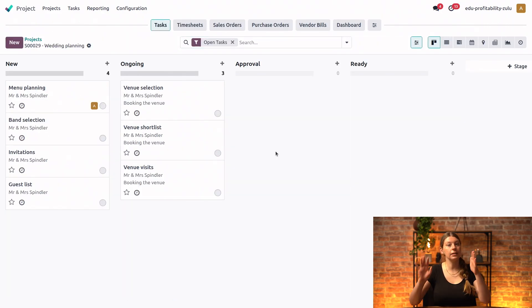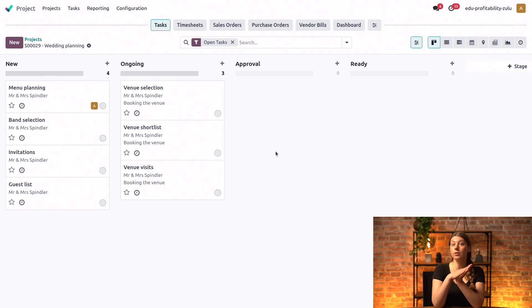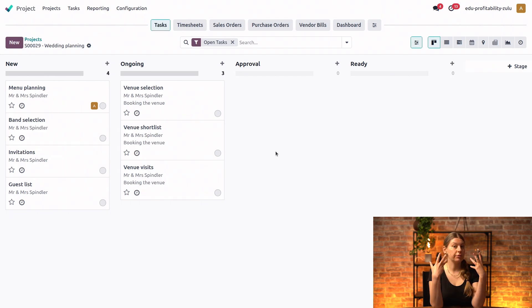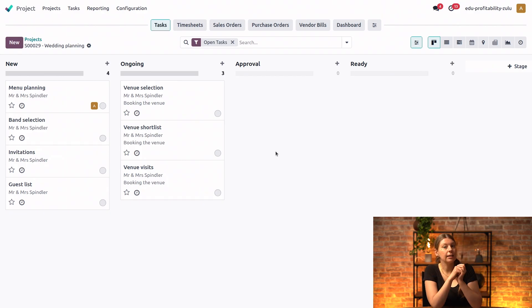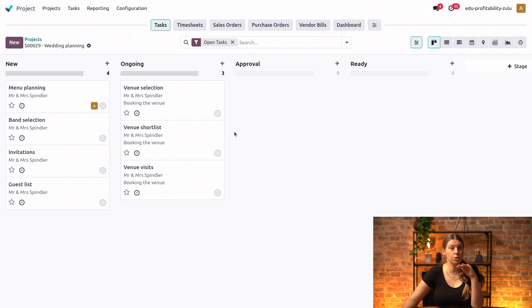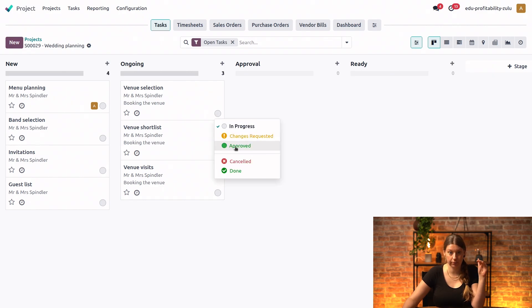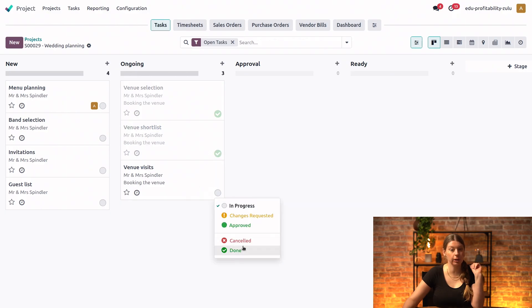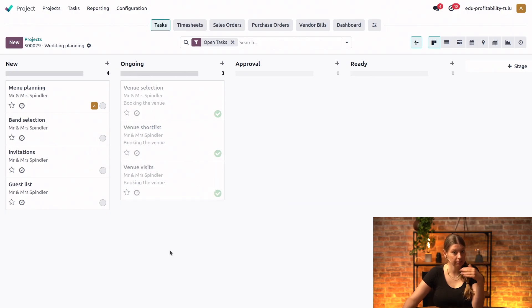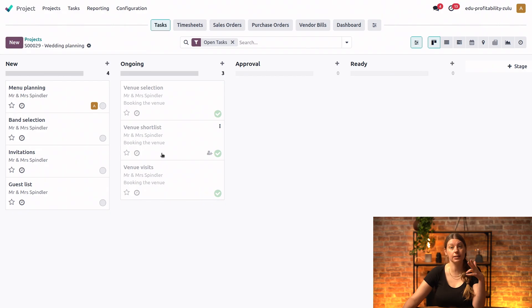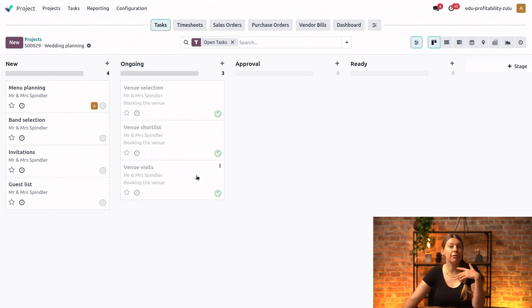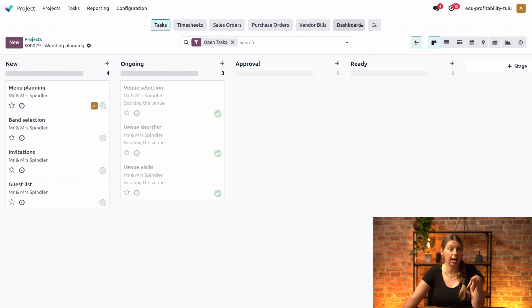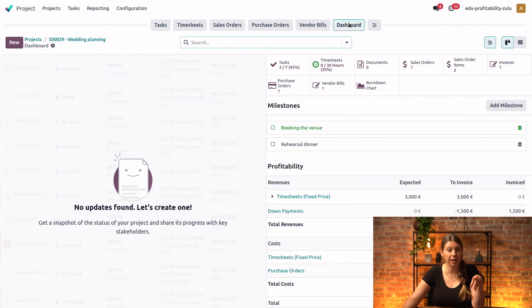Perfect. Now that it's done for all of those tasks, we can say that we're going to actually handle all of them. And we can now mark them as done. So we will just do it really quickly directly from the Kanban view. Done for the venue selection, done for the venue shortlist, and done for the venue visits as well. Perfect. So now the three tasks that are linked to this milestone have been accomplished. And we can use our handy top bar to access the project dashboard and see our milestone status.